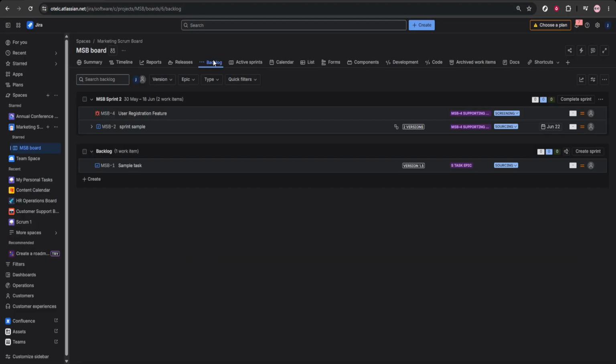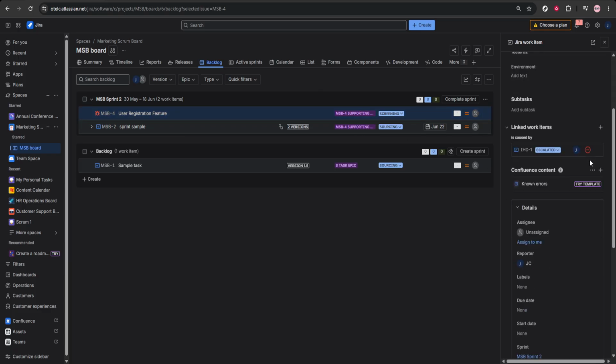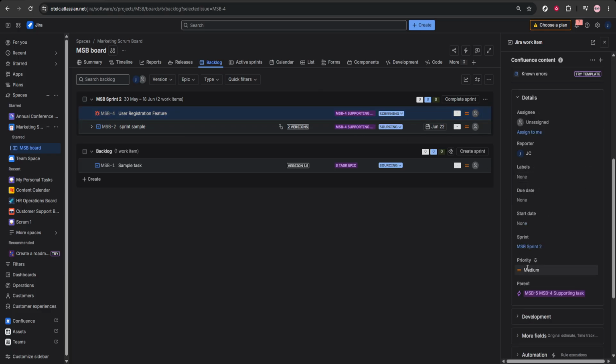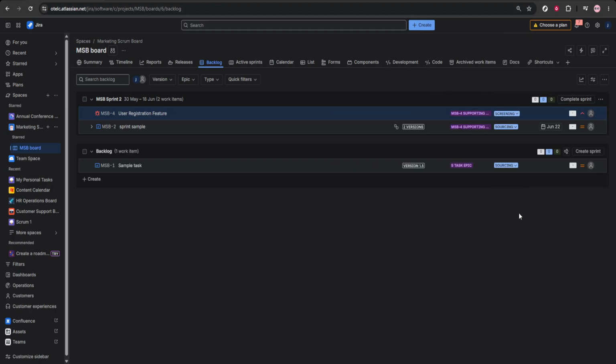Finally, use filters to manage your backlog more efficiently. Go to Issues, then search for issues and create helpful views like unassigned issues, old unresolved tasks, and high priority items. Review these filtered lists regularly so cleanup becomes faster and more consistent. With a simple routine like this, your Jira backlog stays organized, actionable, and much easier to manage.